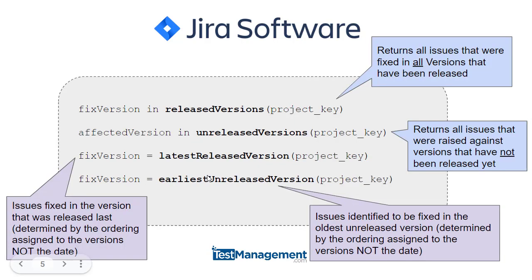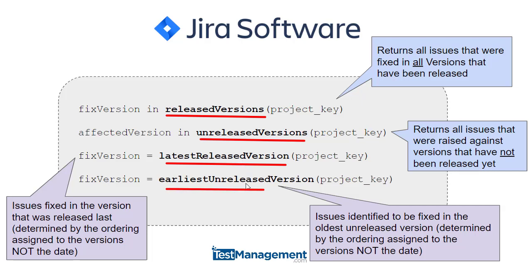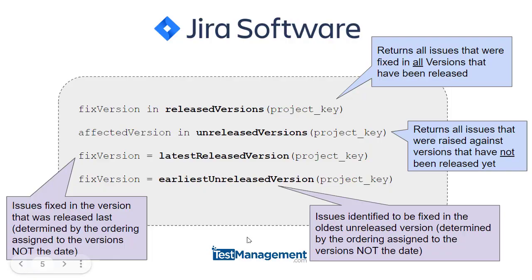In summary, you've got four functions that you'll find useful: releasedVersions, unreleasedVersions, latestReleasedVersion, and earliestUnreleasedVersion. That should give you all you need to power search for issues based on versions using JQL.